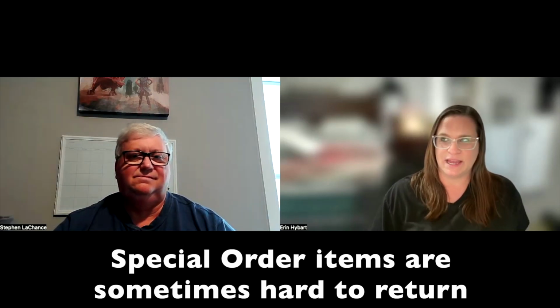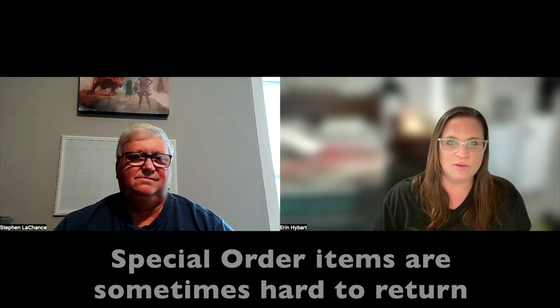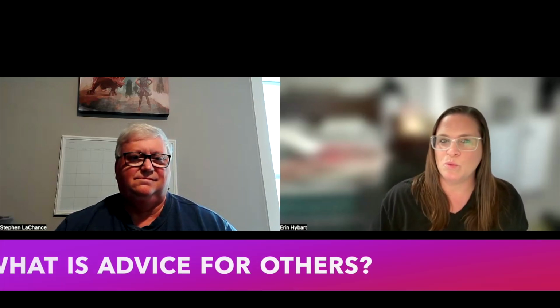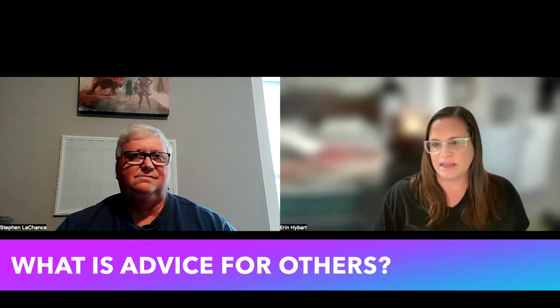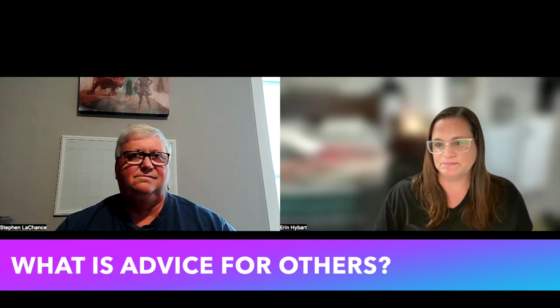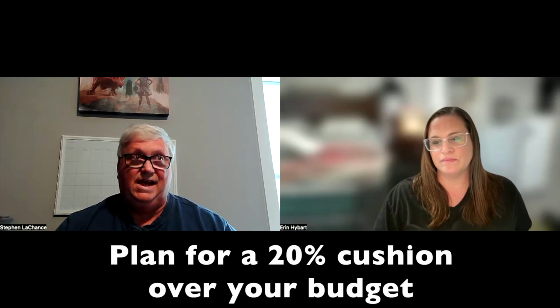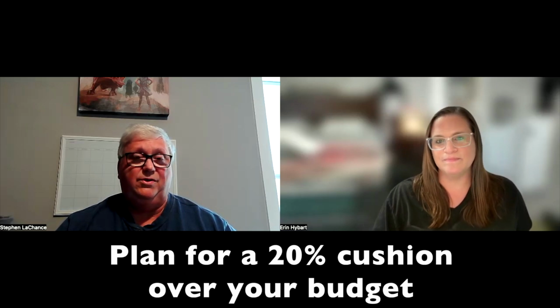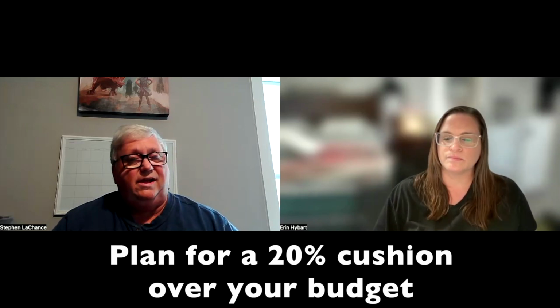So if you were to say to someone thinking of building an ADU, doing something similar to what you did, what's that advice? What do they need to know? Give them some good words of wisdom. Plan for some unexpected costs. That'd be the first thing I would do. Probably 10 or even 20% above what you think.